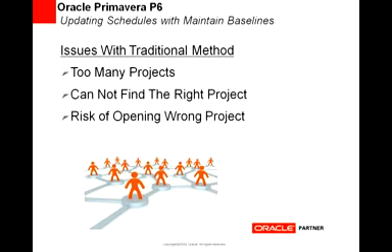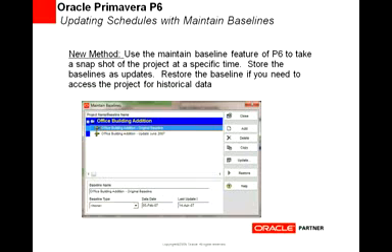So what I'm going to present today is the new method of doing this, which some of you may know. And instead of making a copy of the project, you're going to store that update as a baseline in the maintain baseline feature. And if you need to reference that information for historical use, you can restore that baseline and